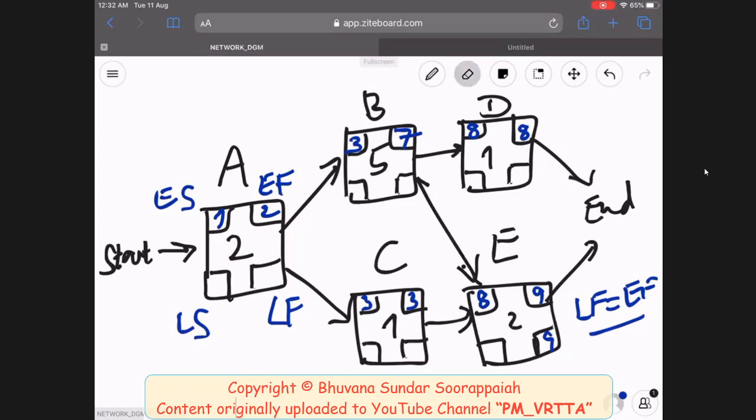Now that you have done this, you use a similar formula to calculate the late start. I'll write this here. You are going to finish an activity on day 9, which means at the end of day 9. It's a 2-day activity. A 2-day activity that finishes on day 9 must have started at the beginning of day 8. So early morning of day 8 it starts, full day 8, full day 9, 2 full days, 2-day duration, you finish that.